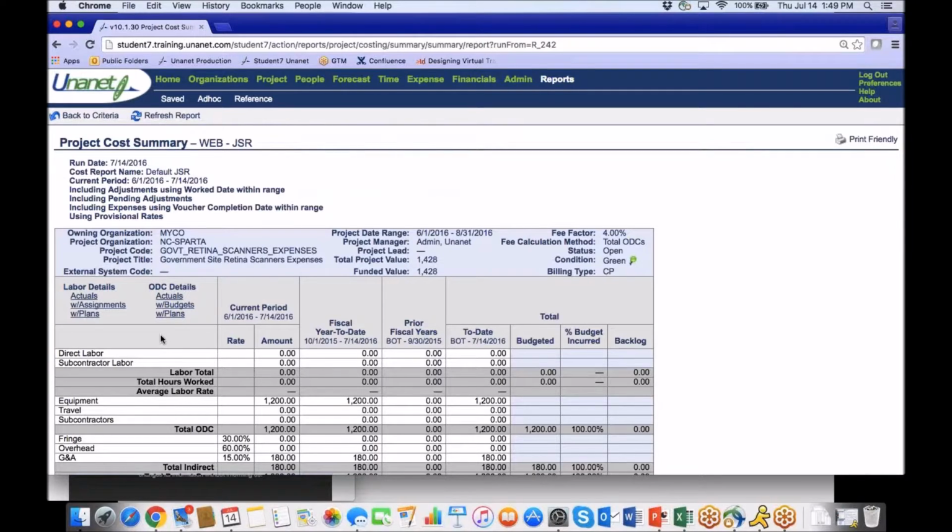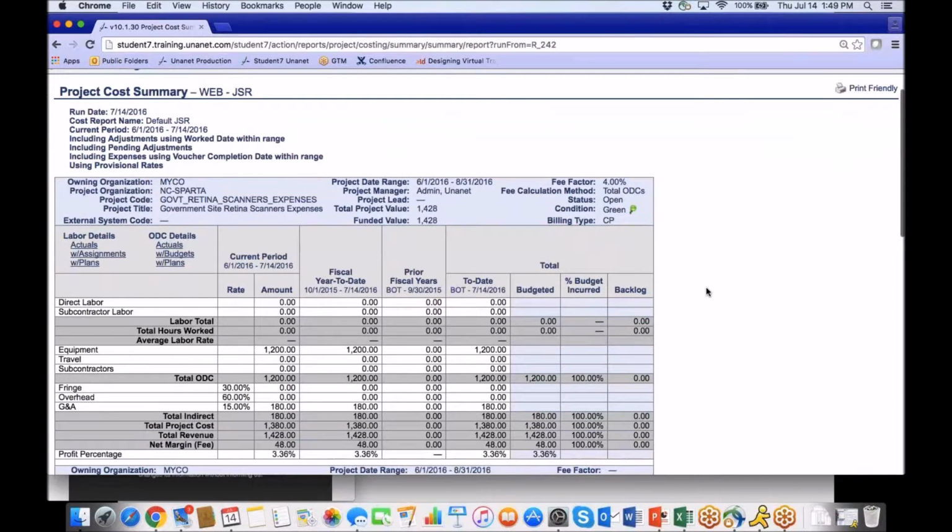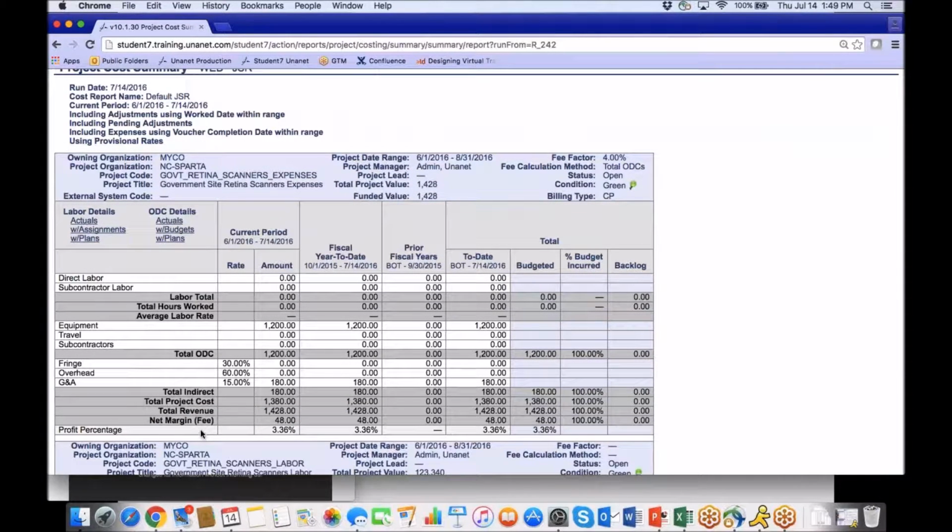Those rows have to be defined and mapped to those who are charging time with their assignments and those who are charging expenses as well. So it ties in to be able to view the labor and expenses and then apply burden costs to assess the total project cost, what the revenue is going to be, and in our case, we're shooting for a particular profit percentage of 7.5% as well. But we also need to manage the project based on that bottom line revenue number that we promised.